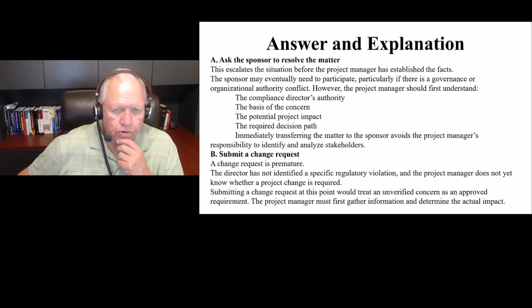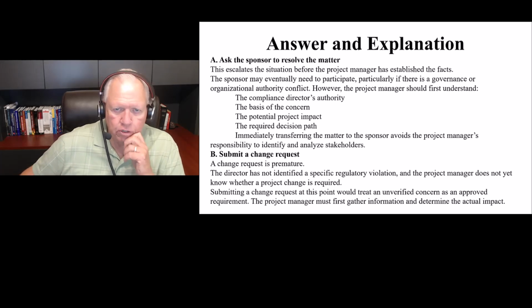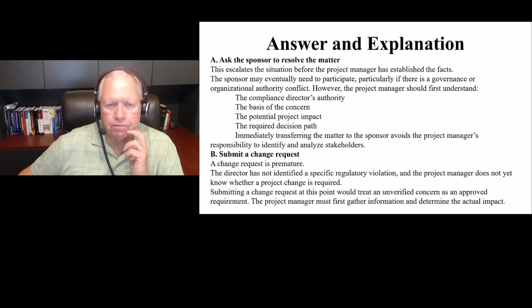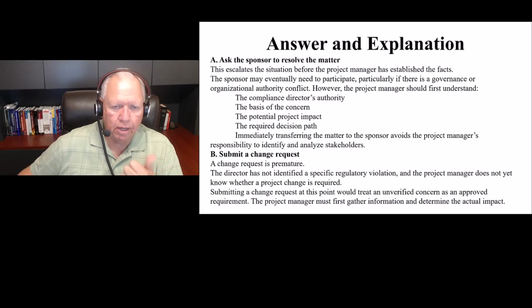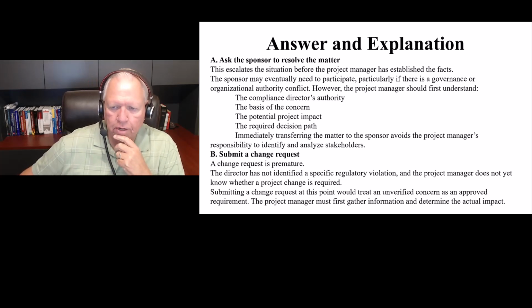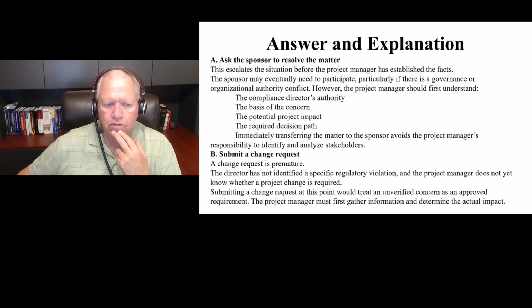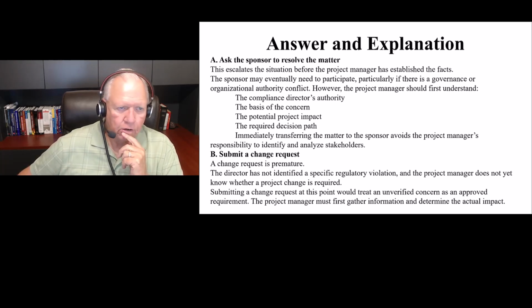So, ask the sponsor to resolve the matter. This escalates the situation before the project manager has established the facts. The sponsor may eventually need to participate, particularly if there is a governance or organizational authority conflict. However, the project manager should first understand the compliance director's authority, the basis of the concern, the potential project impact, and the required decision path. Immediately transferring this matter to the sponsor avoids the project manager's responsibility. So, identify and analyze stakeholders.